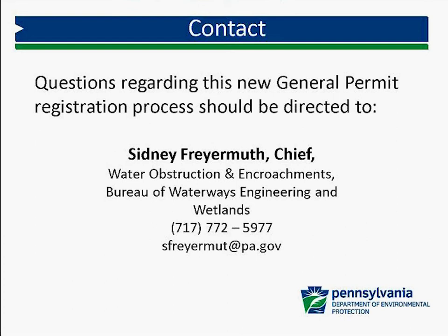On the previous question about the permit decision guarantee, one change that you need to be aware of is we moved GP5 to the other general permits and left GP11 and the joint permit under permit decision guarantee. Our goal is, because of less information being required, that there shouldn't be an issue with permit decision guarantee using a one-step process. And besides, if you have a GP5 that was required under permit decision guarantee and one that was not, it caused confusion. So we tried to have all the GPs together except 11 to provide clarity.